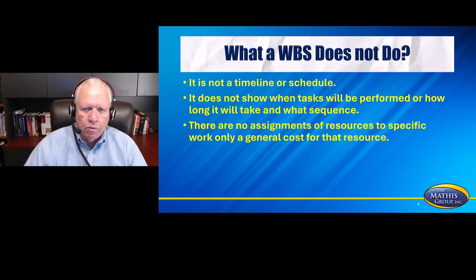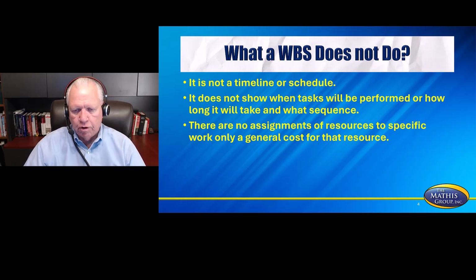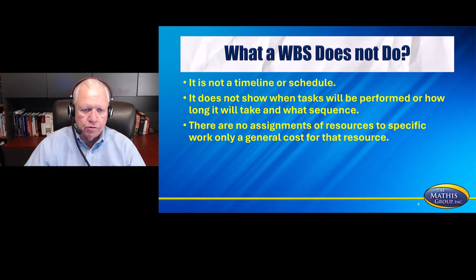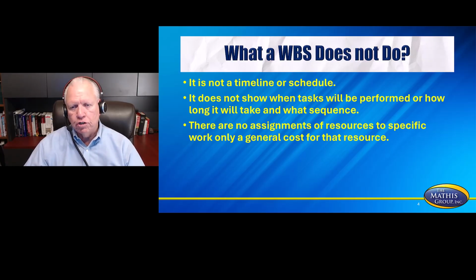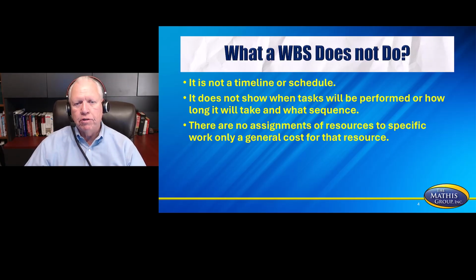So what a WBS does not do. This will trip you up if you're not used to working with work breakdown structures. It's not a timeline. It's not a schedule. So that's not what this is. This is a structure that gives you the ability to make initial estimates of your project. And then after you look at risk and other things, you massage those estimates until you finally come out with the real budget and the real duration for your project.